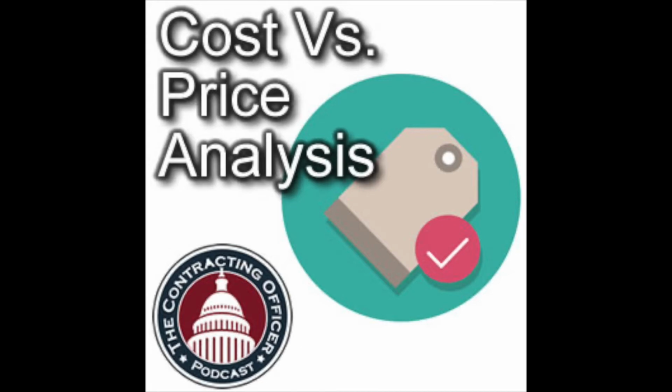It also says cost analysis shall be used to evaluate the reasonableness of individual cost elements when certified cost and pricing data are required. That's an important distinction, and we're going to dive into that a lot deeper. But to sum it up, when you don't have certified cost and pricing data, you only have to think about price analysis. If you have certified cost and pricing data, then you're doing cost analysis and you're digging in.